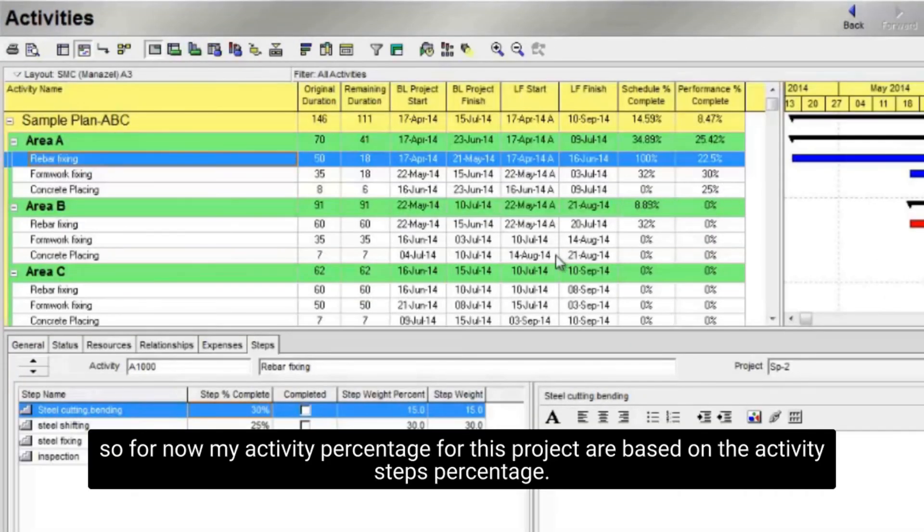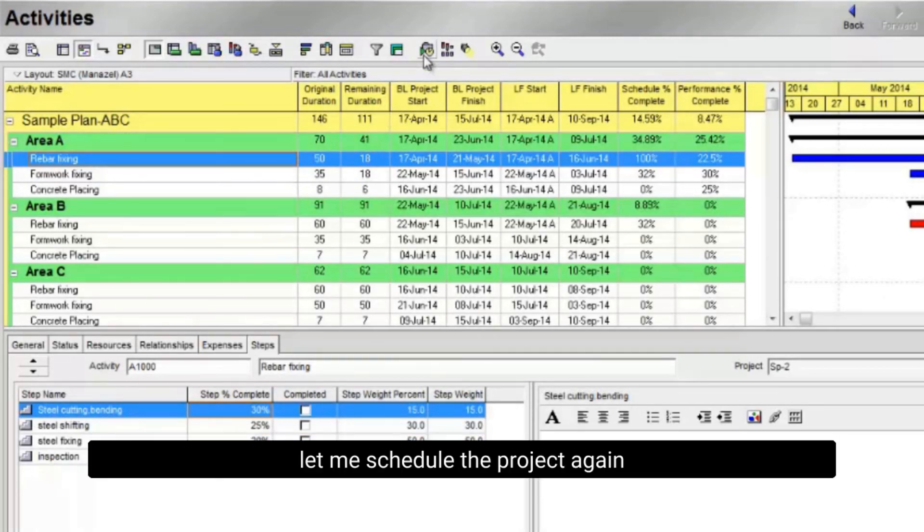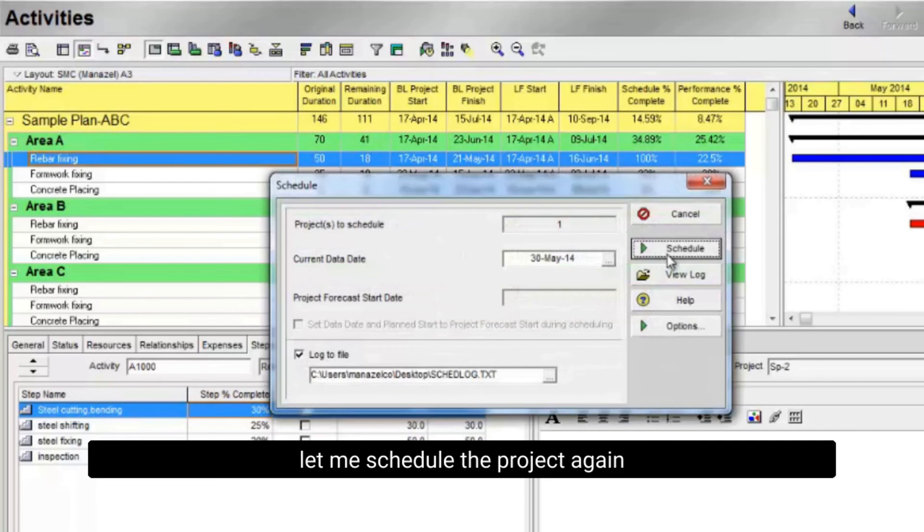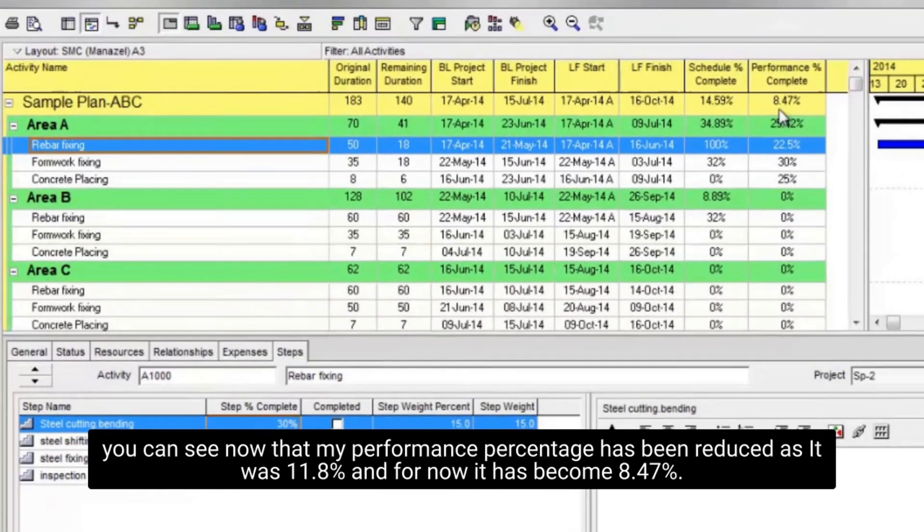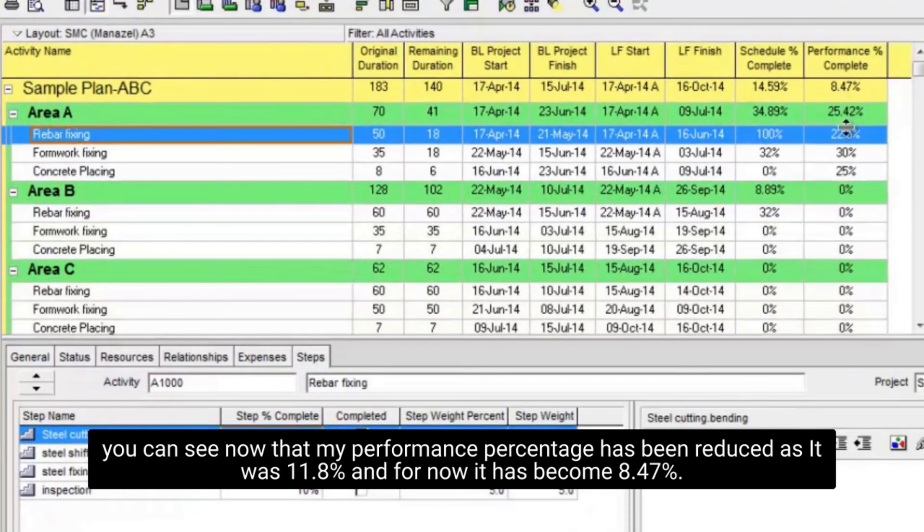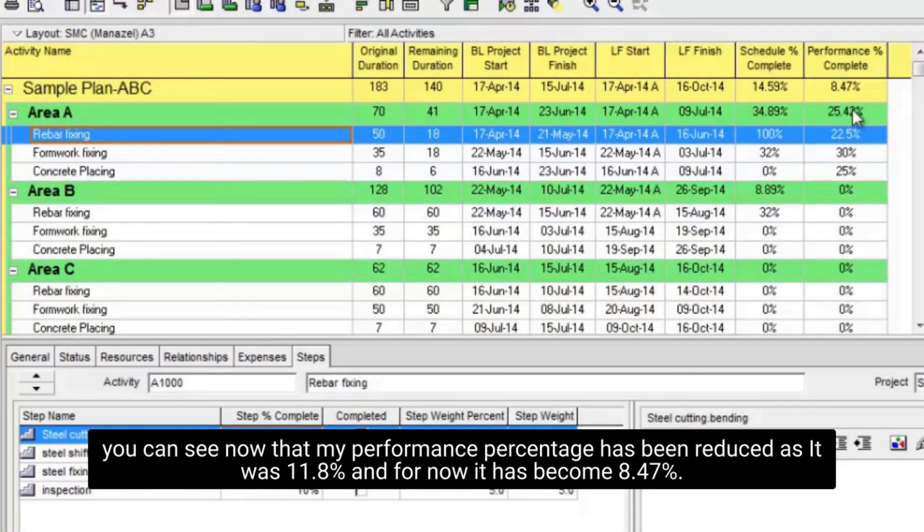Now I will open my project again. So for now my activity percentage for this project are based on the activity steps percentage. Let me schedule the project again. You can see now that my performance percentage has been reduced as it was 11.8% and for now it has become 8.47%.